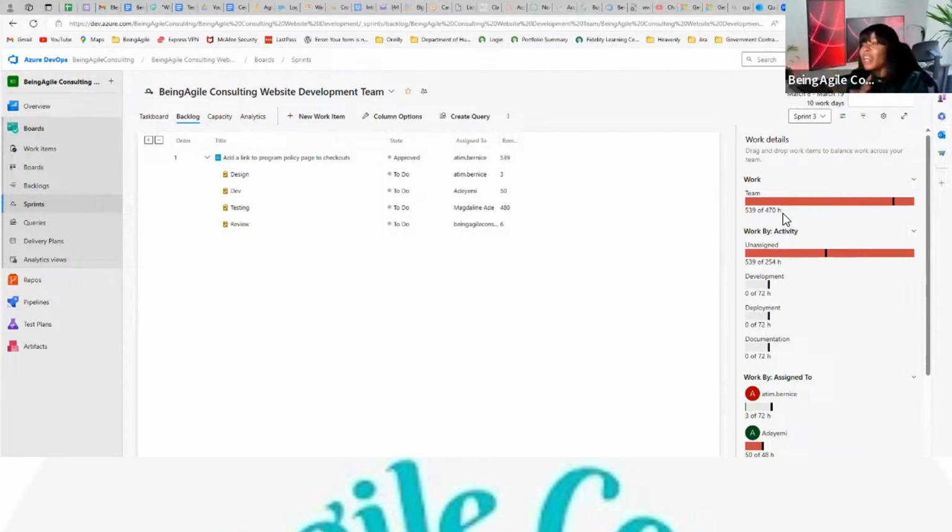So team, what do we do? We need to make adjustments. So in this case, they'll come back and start seeing how they can reprioritize. They can now remove some items from the sprint backlog and drop them back into the product backlog so that the capacity will finally be balanced. That's one option. Hold on, Nicole.